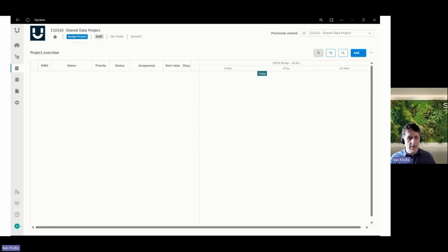So we've had a project kickoff. We've set a particular date on this Gantt chart. And now we're going to put another task below this. We're going to task a user role to produce a general arrangement for this particular design. So instead of setting this helpful chap, we'll put the lead mechanical designer here. We'll give them 10 days to do it, and we're going to get them started as soon as possible. So this is data inputs.